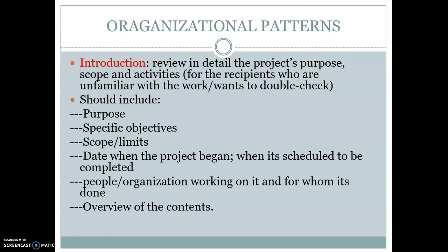Fifth one, people or organization working on the project. Sixth one, people or organization for whom the project is being done. And the last one is overview of the contents of the progress report. So these are the things that we should include in the introduction.